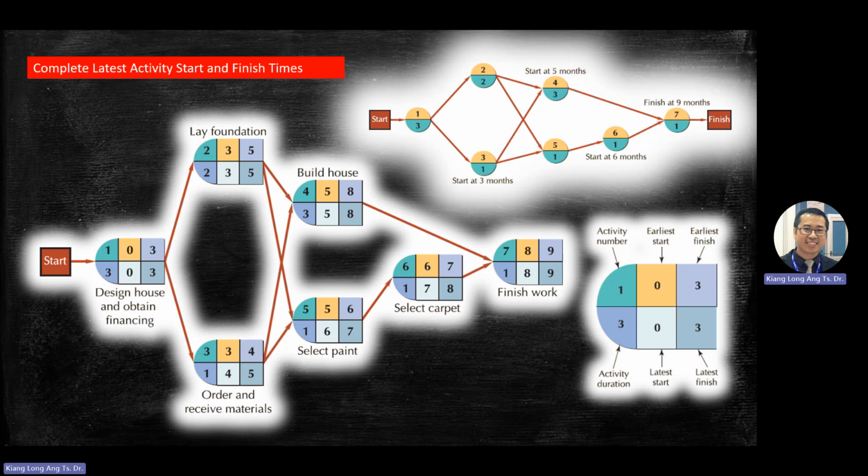This one, method number 4. You need to build a table. It's called slack time. Slack time, what is slack time? Slack time means, in the layman term, smoking time. Right? You can relax and chill. When your slack time equals 0, means you don't have time to go and smoke. Then that is a critical member. Means you cannot stop. It's a very important project. You have no time to smoke, no time to relax.